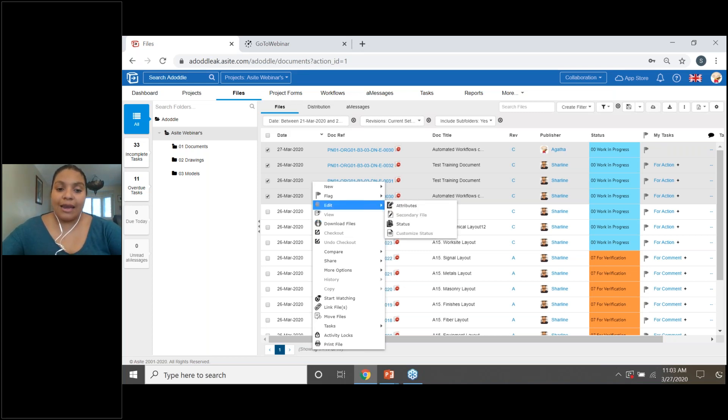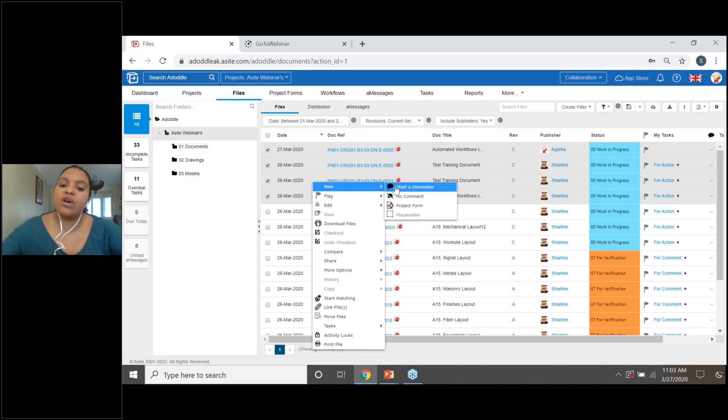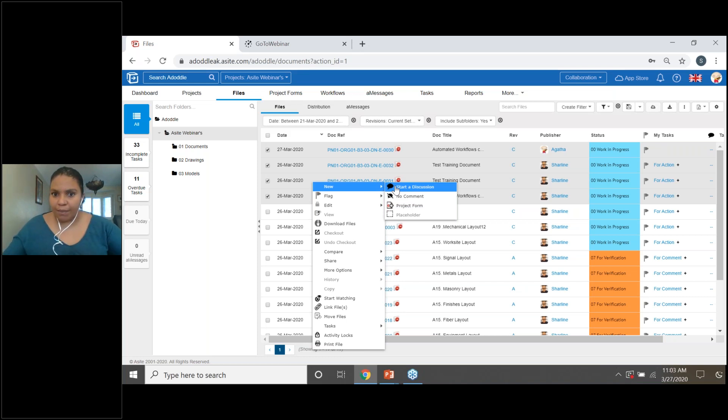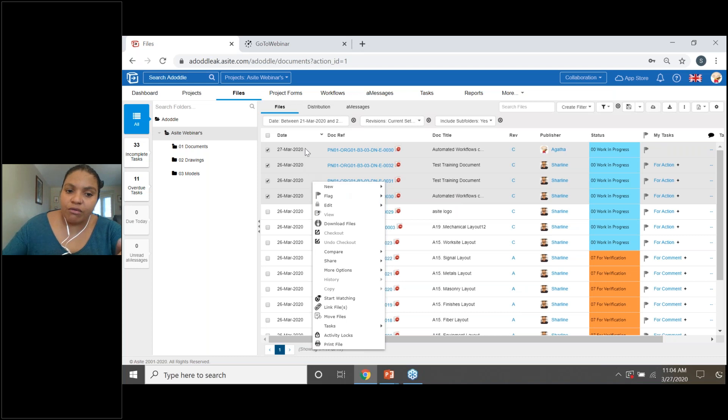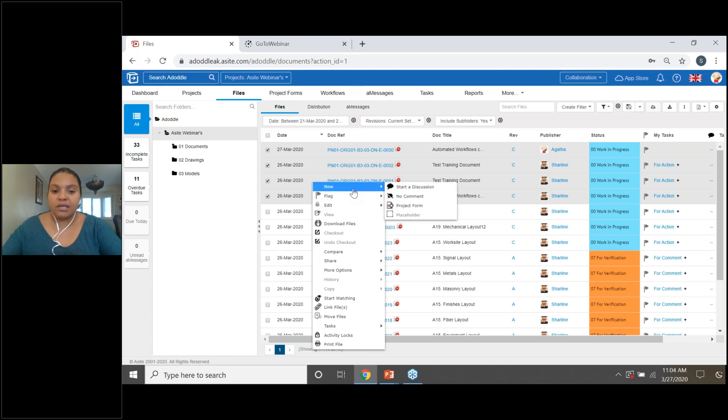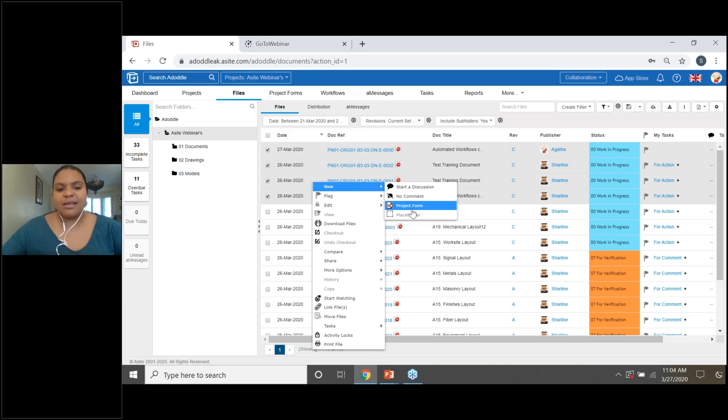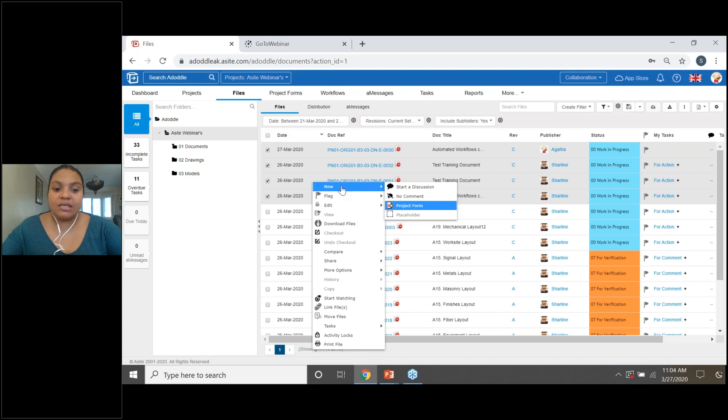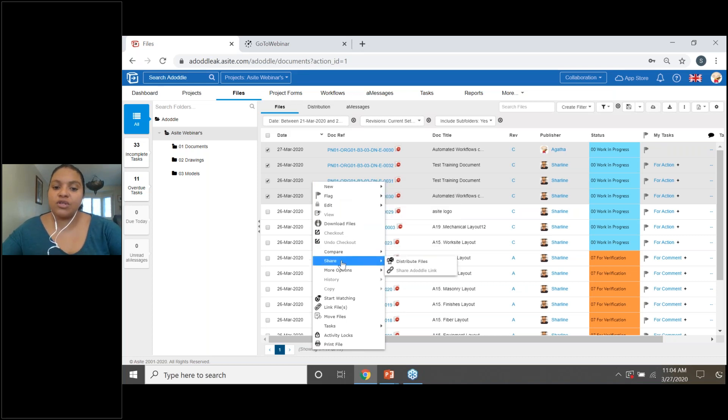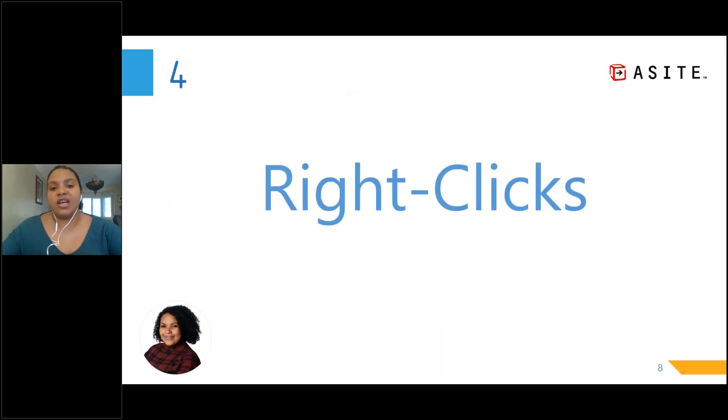If we look at the next right click functionality, we've got new. Now, if we hover over new, if we wanted to comment or start a discussion on particular files, you can do it straight from a right click. Or one of the most important things that might be happening due to what's happening in the world at the moment, you may need to create some project manager's instructions for compensation events. You can do that by you can associate your documents that are in your files area. As we can see, if you hit the new button, you've got project form. From here, you'll get the option to associate any compensation event forms. So to sum it up, right click is a little bit like shortcuts. So I've shown you how you can create and associate a file from a form into a form. You can download multiple files and you're able to share files.